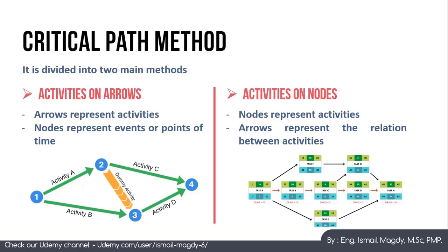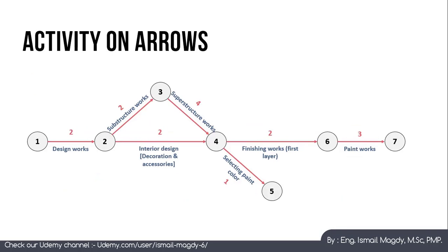Here we can see a sample Activities on Arrows schedule for a construction project. All arrows show a specific activity including its duration in months, while each node represents a specific point in time. For example, node 1 represents the start of the project, and the activity between nodes 1 and 2 is design works, consuming two months.